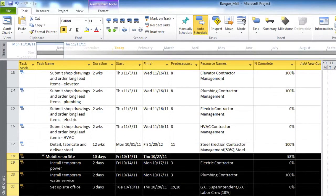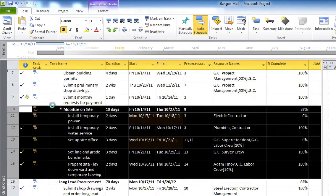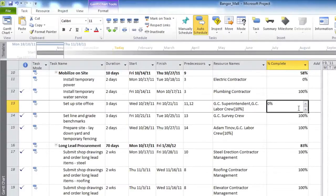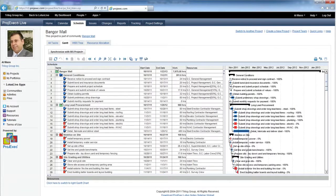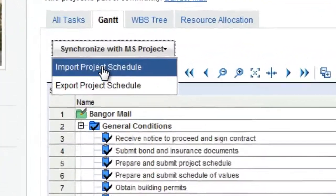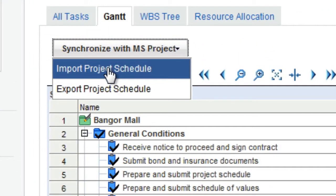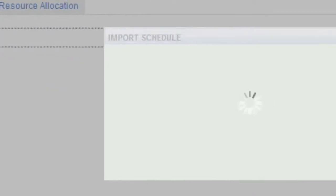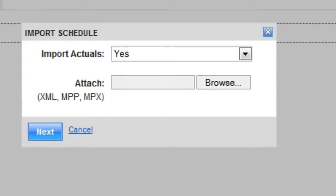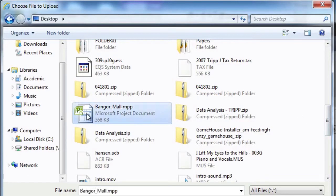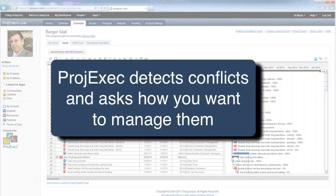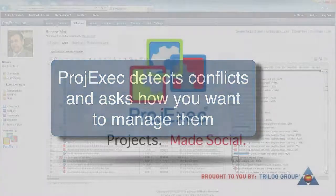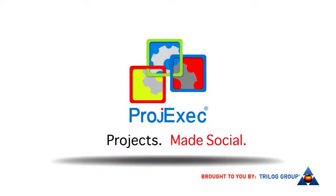We'll move some tasks around and update some task progress levels. Now you can import these changes back into Project Exec Live. Click on the Synchronize with MS Project button and click Import. Choose the file you've modified and import the changes to Project Exec. Project Exec detects any conflicts and asks you how to manage them.